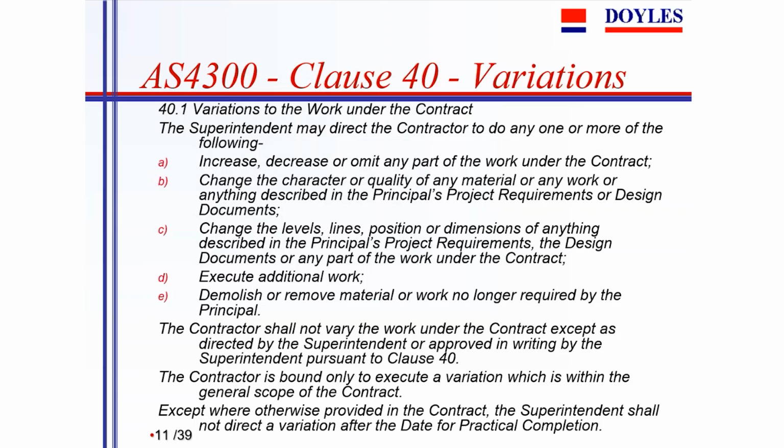But it's often important to review the status of the design, to see how detailed it's been done, and to see whether or not it integrates properly. A well-prepared design might have a lot less variations than something that's been thrown together in a hurry to get the building started. The other aspect is variations are almost inevitable. That is, it's a rare construction contract that gets to a finish line without having looked at variations.